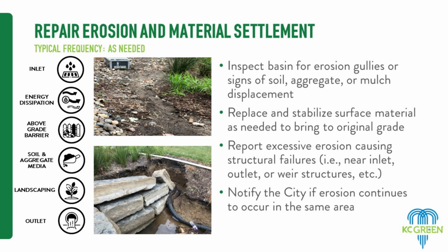There are changes that we can make, and you are an important part of seeing that and helping us with those changes. Now, those changes, if it's that aggressive, are not a part of your contract, but you let us know, and then it can be added. We don't want you to have to repair the same rill every week, all summer long. That's not smart. Then we need to change the design.